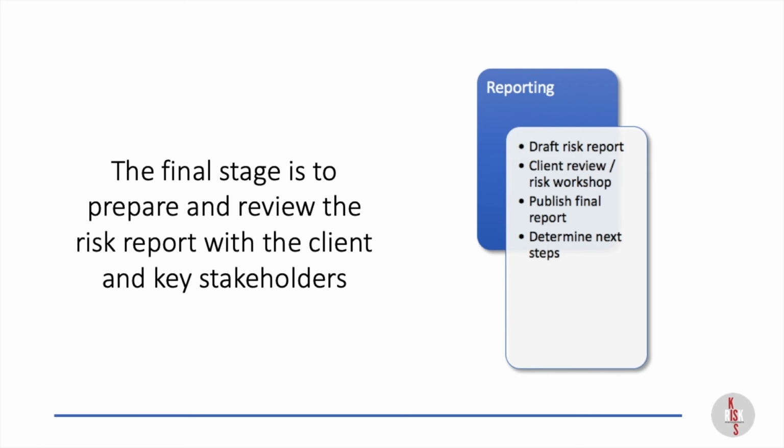Now, I'm not suggesting that you change the report to make it look better, and I'm not suggesting that every comment or recommendation will be valid. But you do need to have this discussion with the client, with the users, to make sure they're getting the information that they want and that they understand what's in your report. Once you've completed the reviews and the workshop, you publish the final report, and that won't change. That is then the risk assessment report as of that date.